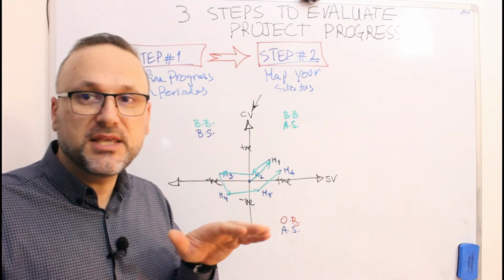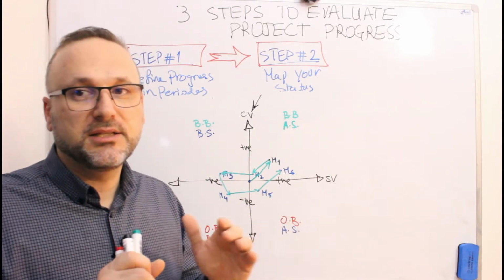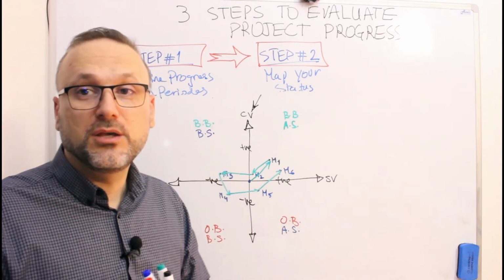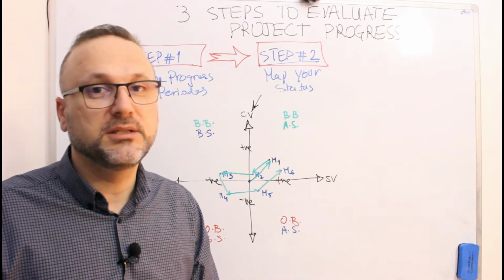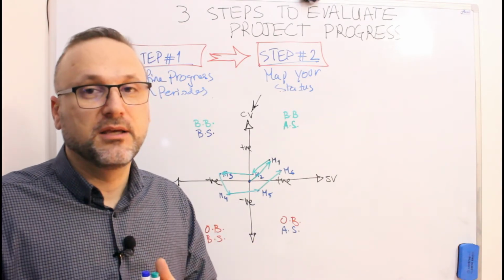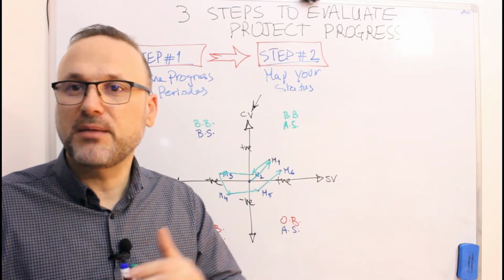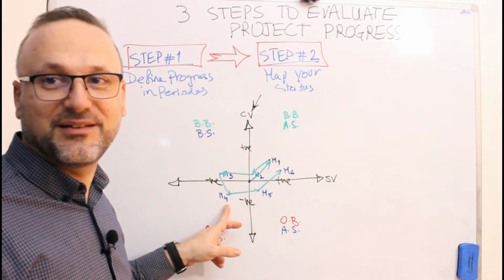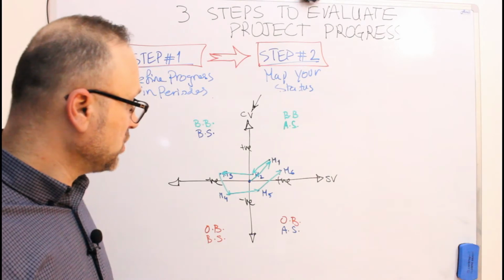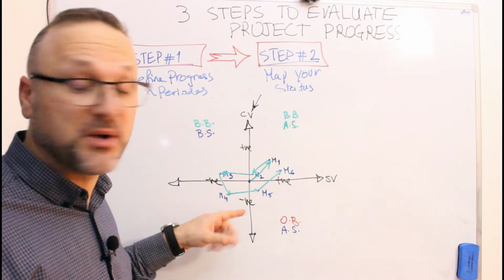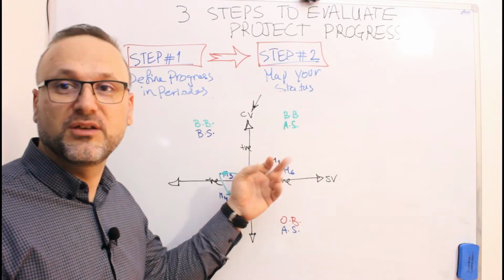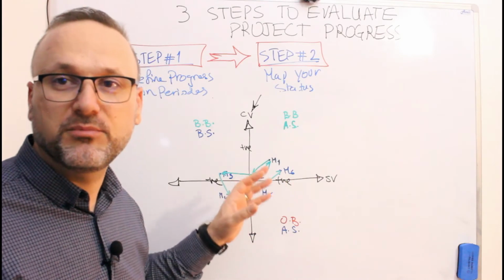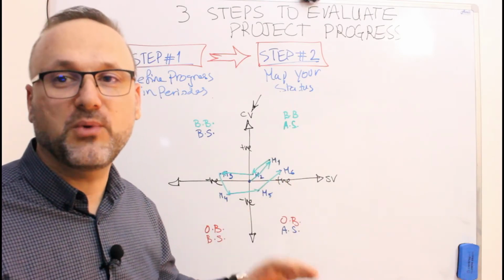If you are seeing that your project is a little behind the schedule, there is something in delay, and you just did something. You did your crashing of the project, or you did your fast tracking. You did some action. You increased your manpower for a reason, and you've been over the budget because you increased your manpower, but you are back again. So that means your actions really worked, and you are planning and monitoring and controlling it in a proper way.